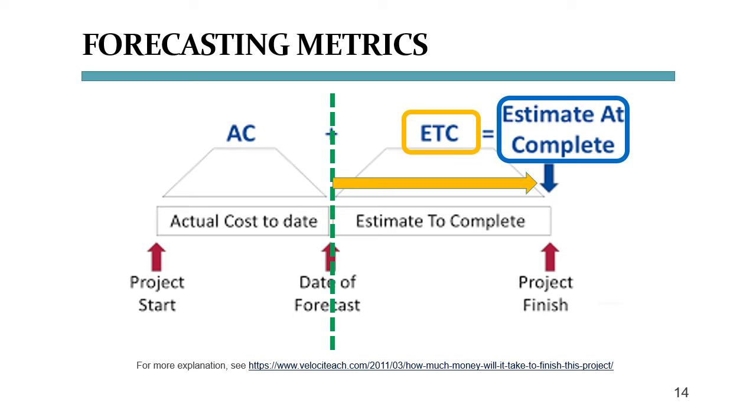The estimate at completion, or EAC, is the forecasted cost of the entire project. It will change depending on how your earned value for the project, that is the amount of work completed in relation to the initially planned budget at completion, performs. If your earned value is performed and costs exactly as planned throughout your project, your estimate at completion will be the same as your initial budget at completion. Again, because earned value data changes frequently, that is a very rare case though.